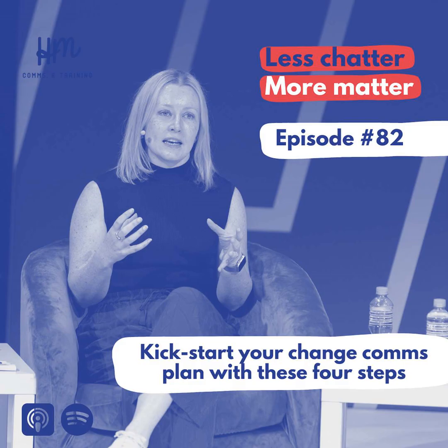Now, the reason that's important is because while people are generally good with change that they initiate or have a say in, they are more resistant to the change that happens to them. And it also means that people who have little control probably have little influence or a depth of knowledge of the change because they just haven't been involved. So you end up with 4 quadrants in this matrix. The bottom left is your low control, low impact quadrant. So these are the audiences we call our interested observers.